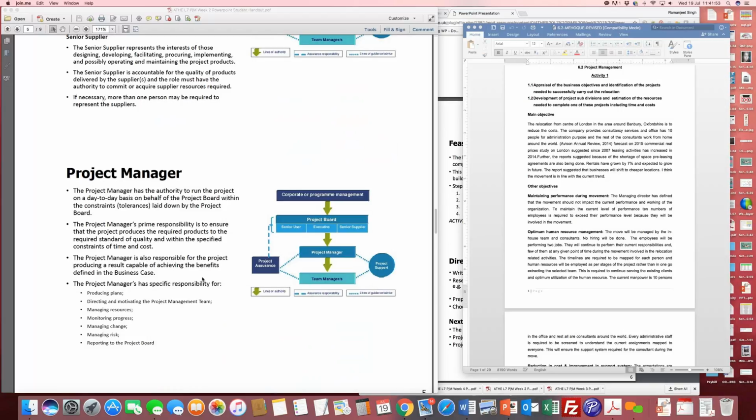So he will break them down into work breakdown structures, certain phases: phase 1, phase 2, phase 3, phase 4, phase 5, and in phase 6 the building was handed over to the decorators. Once the building was approved and done, his part was to hand over to decorators, so that they could start furnishing the offices, the building, the flats, and all those things. The project manager's main responsibility is to ensure that whatever has been planned out in the charter, the project charter, is actually implemented to the core.